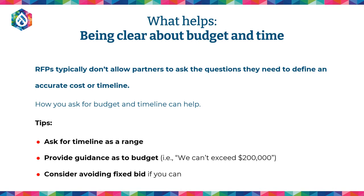Or if you need it delivered in 4 months and a vendor can't start for 3 months because of resource constraints, there's really no point. They should withdraw, and you should let them know enough for them to withdraw on time and not waste your time reviewing a proposal that doesn't make sense. But kind of golden triangle constraints there, helping set clear priorities for your vendors and for yourself is really helpful.